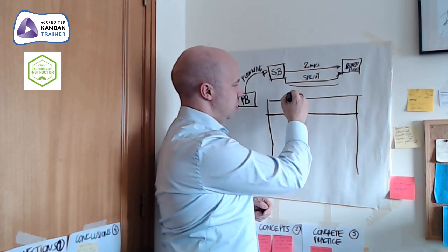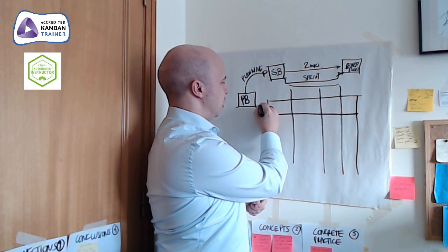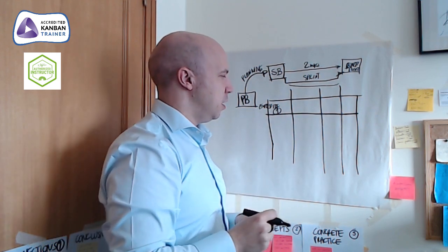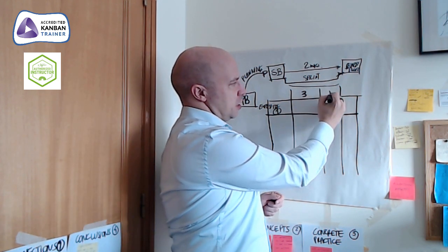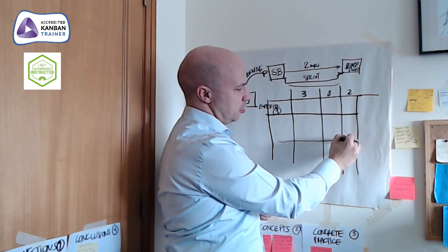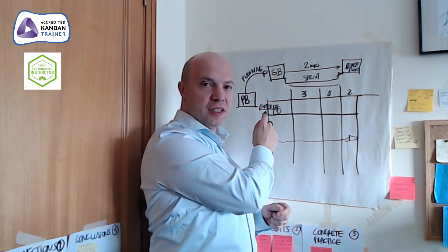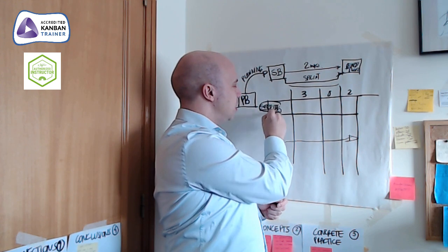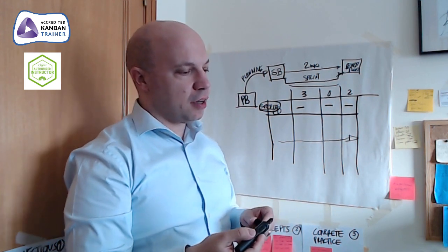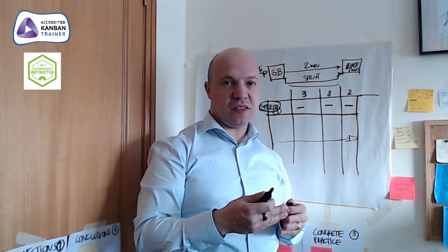of service, which means you have your workflow, and let's say you have a lane for a class of service that we call expedite, which has a work in progress limit of 1. And you have your work in progress limits, etc. And your normal cards will circulate here. But if the criteria are met for an emergency, like this expedite, we are already ready to take it with a different priority. So we already have policies that allow us to deal with interruptions, if those interruptions are really